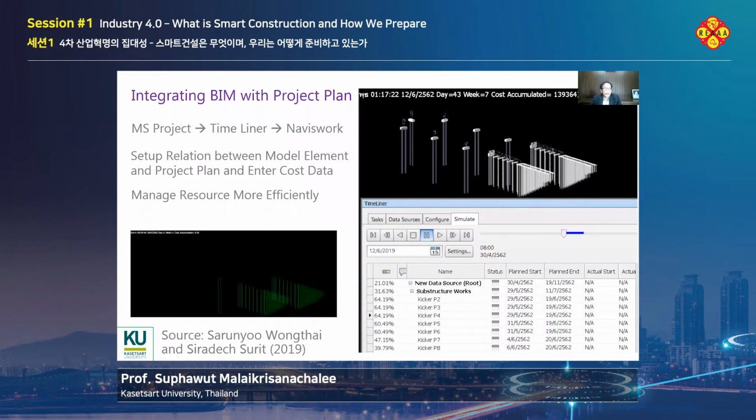You can also integrate the construction project schedule with the BIM model. Like in this situation, they integrate the schedule in Microsoft Project with BIM through Navisworks. So this way, you're going to know what is going to happen and when and where. So you can plan the construction site layout better. You can plan your resources. You can plan your machines more efficiently.